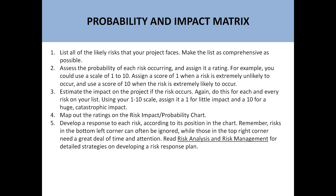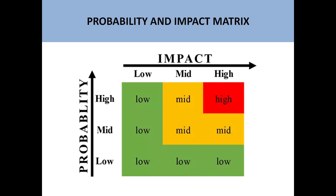Estimate the impact on the project if that risk occurs. Again, use the same 1 to 10 scale — assign a 1 for little impact and a 10 for huge catastrophic impact. Then map out the ratings on the risk impact probability chart, and develop a risk response for each risk according to its position in the chart. This is basically the overall approach.